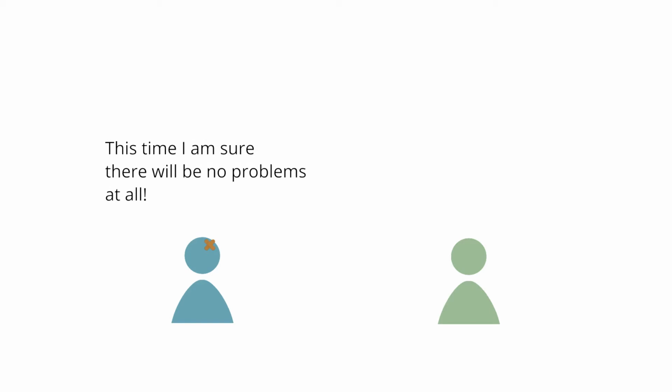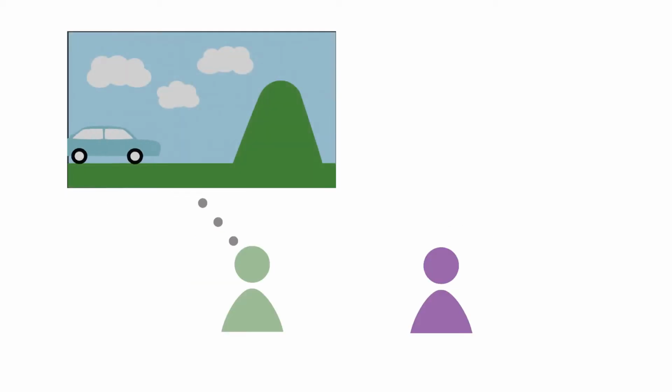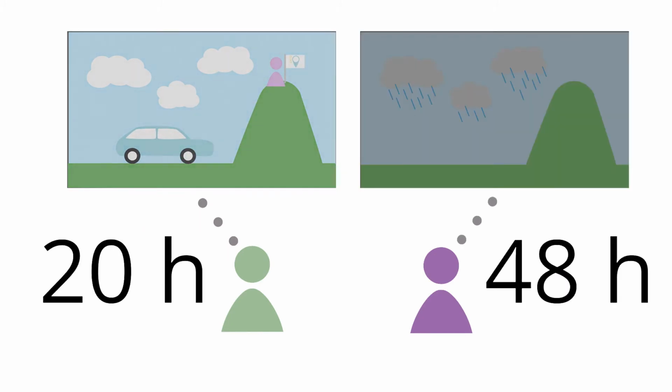Evolution has made humans into optimists. This makes us prone to overlook difficulties and risks. We also want to please and to present ourselves in a good light. That is another unconscious incentive to underestimate how long a task will take. As the PlanMinder asks for two numbers, you can put all your optimism in the best-case scenario estimate. You can then reason about everything that could go wrong and find a reasonably sure estimate. Reasonably sure is defined as 7 times out of 10 the activity will take less time.